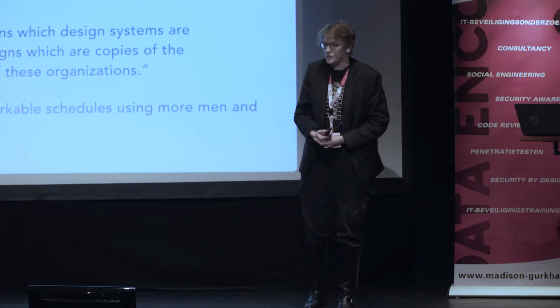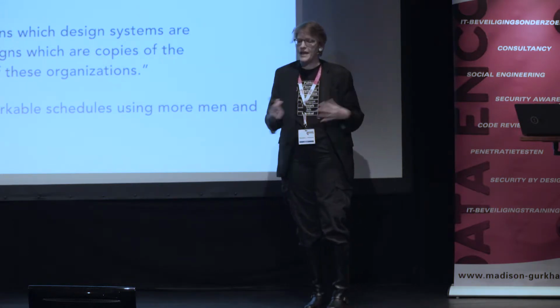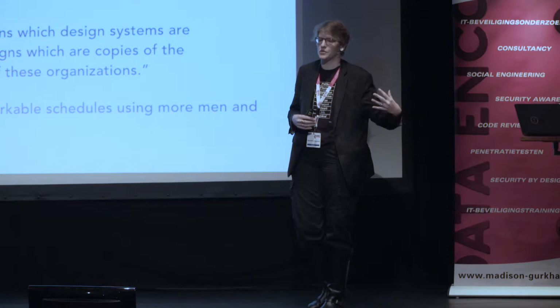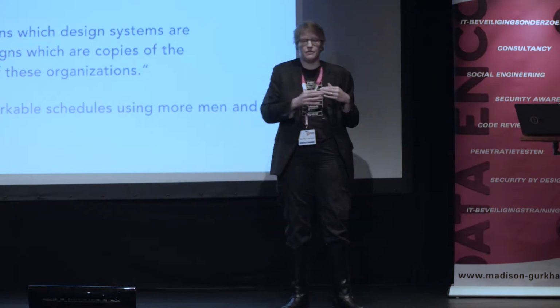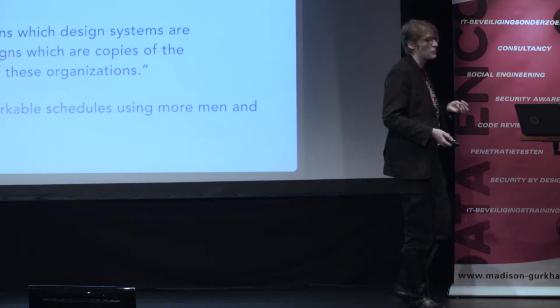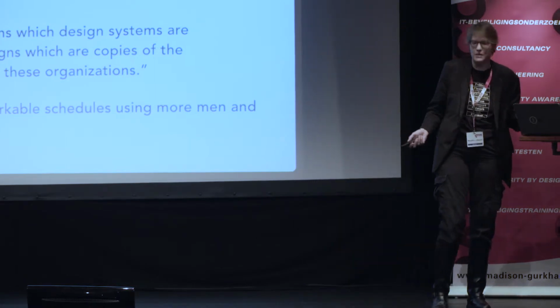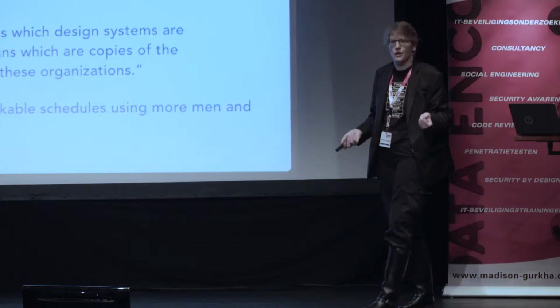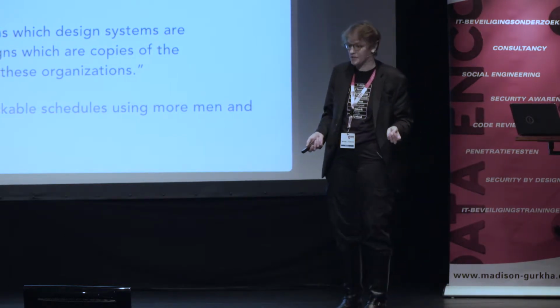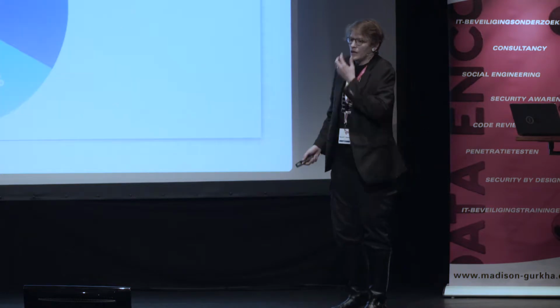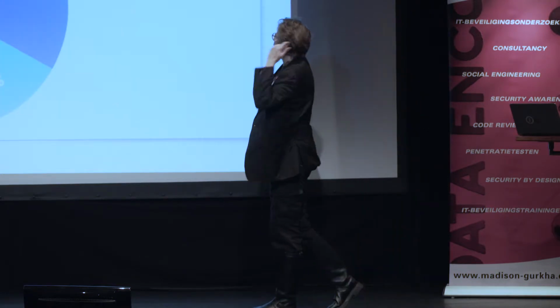But Brooks concludes that you can't fudge the sequential constraints versus the independent subtasks. If 2 tasks are dependent, you have to work on them one after the other, and so you cannot speed things up by trying to throw more people at it, unless what you actually have is more independent subtasks. He also talks a lot about scheduling.